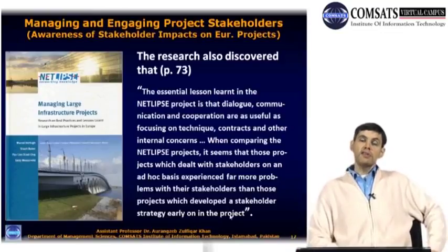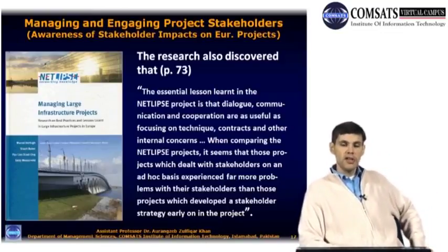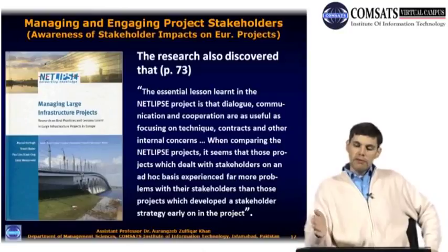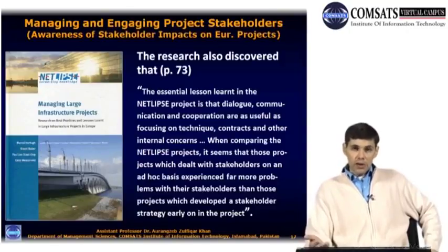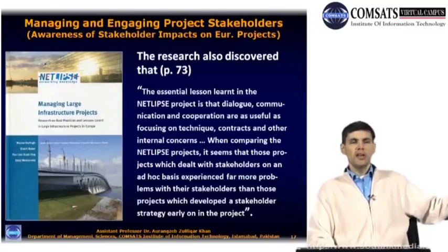So here again, lessons learned from these large infrastructure projects is that if you, right from the beginning, have a proper stakeholder management and engagement strategy, then you are more likely to be successful. You will experience less problems, less issues, less challenges than you would if you do not have such a strategy, that if you just deal with stakeholders on an ad hoc, as-come basis.